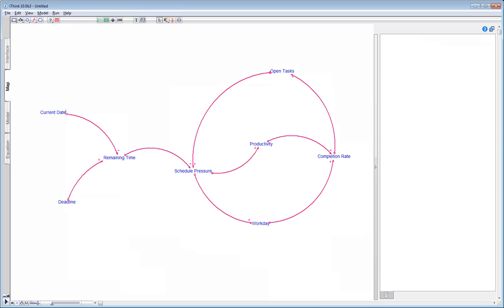In this case, it means that if you spend too much of your time initially procrastinating, you will be hit by very high schedule pressure the closer the deadline comes. If you invest your time wisely from the beginning, the schedule pressure won't become too bad later on. I'm sure this is something you've experienced yourself. This is actually quite exciting, because the feedback system we've analysed here is fundamental to all project management situations. It's the motor that drives projects to completion.